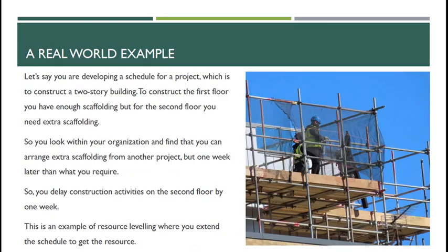So an example I found for this one is, let's say you are on a construction project. Construction's used quite a lot in project management for examples, and we're constructing a 2-storey building. So to construct the first floor we have enough scaffolding, but for the second floor we need extra scaffolding. Okay, so you look within your organisation and you find out you can arrange extra scaffolding from another project, but 1 week later than you require. So you've got a couple of options.